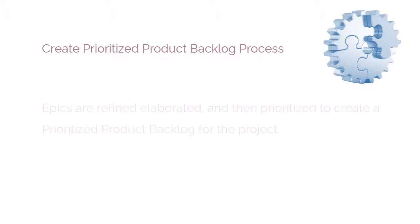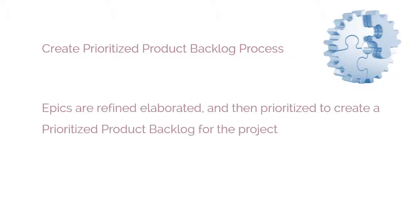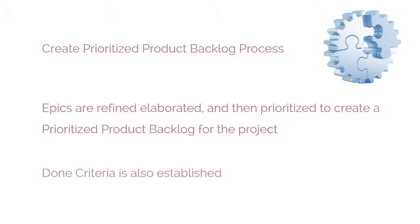The fifth process is the Create Prioritized Product Backlog process. In this process, EPICS are refined, elaborated, and then prioritized to create a Prioritized Product Backlog for the project. The DONE criteria is also established at this point.